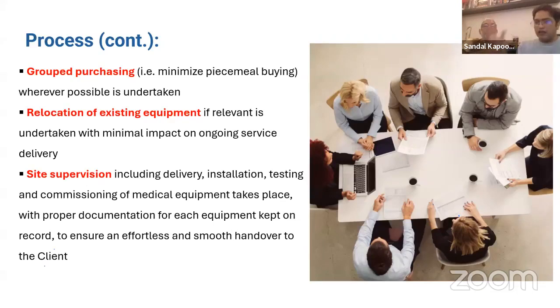Or we can do the entire phasing depending upon the budget. Even for the equipment, we can do phasing. Like if we have, let's say, 20 ICU beds, we can phase them out depending upon the facility type, mix, and the disease pattern.